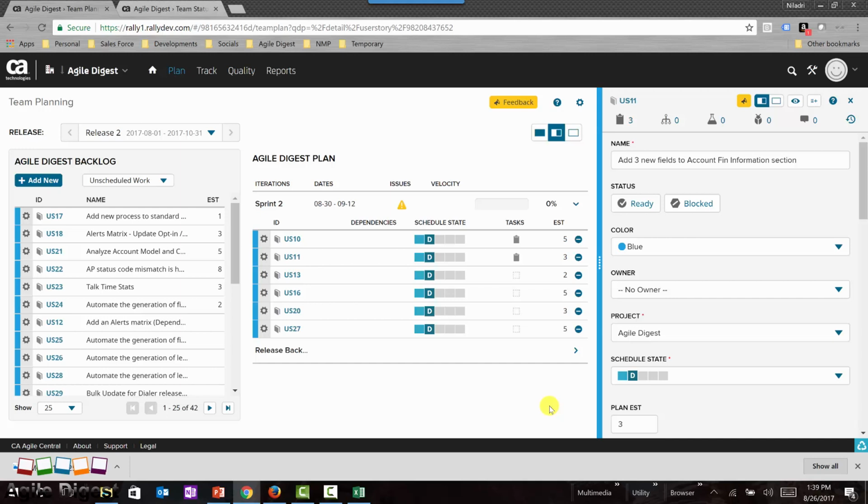Unlike Jira, this doesn't have any start date or start button. Whatever sprint start date you have mentioned, the sprint will start on that day. So this is ideally your sprint backlog you are seeing, but how will you be able to monitor all the stories that are particularly for your sprint backlog? I'll tell you quickly.